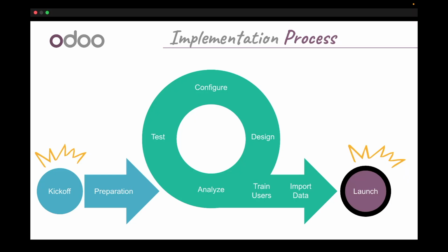Even if I need accounting and manufacturing and inventory and website later down the road, I'm going to start with those 3 apps. To break down this phase, number 1 is analyzing all of the requirements, what you guys want, everything like that, right? Then we're going to go into designing it and configuring it, making sure all the configurations work, and that the flows you were demoed are actually being accomplished in the database. But then, last but not least, we are going to let you test it.